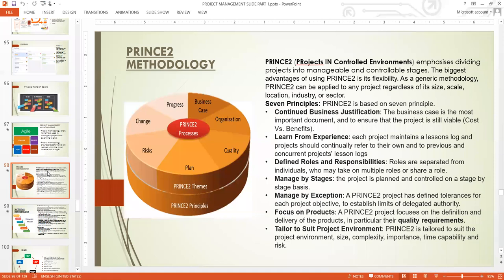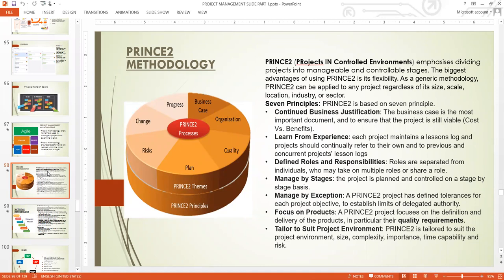According to PRINCE2, when managing a project, the project must continue to be viable — you must continue to weigh the costs. When the cost is outweighing the benefits, PRINCE2 considers that project no longer viable, even if you are still within your timeline and budget. If the project outcome is no longer viable, PRINCE2 considers it not to be a good project. The main focus is cost-benefit analysis.